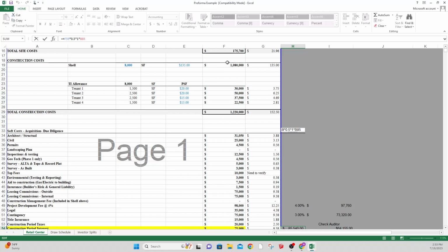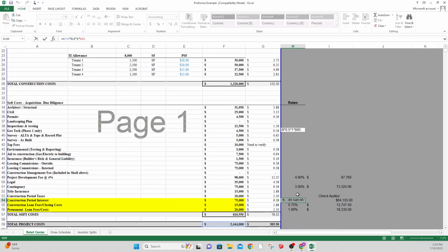You're going to probably, once they do foundations, let's say you give them $100,000. Once the walls get up, it's another, let's say, $300,000. You're in it for a total. So you're going to make those monthly draws, which I can get into in more detail as the third way to look at it. But that's the most simplistic way.